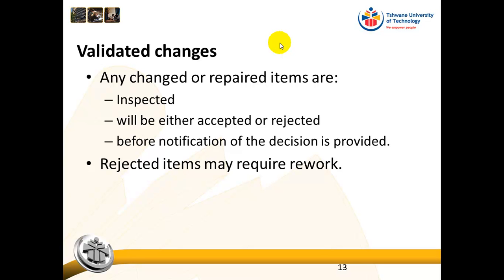before notification of the decision is provided. Rejected items may require rework. Okay, so if we have rework, you can see that the process will then start over again, and the repaired items will again have to be inspected and either accepted or rejected.